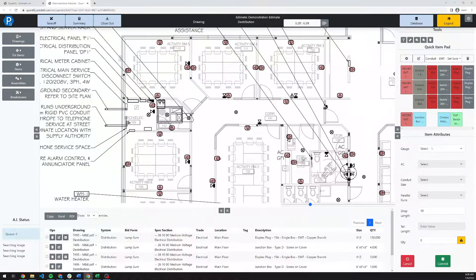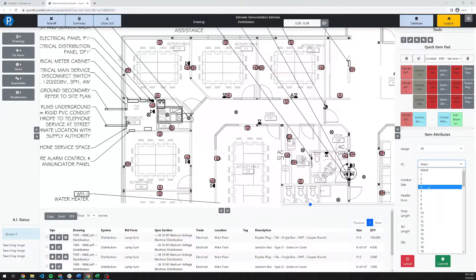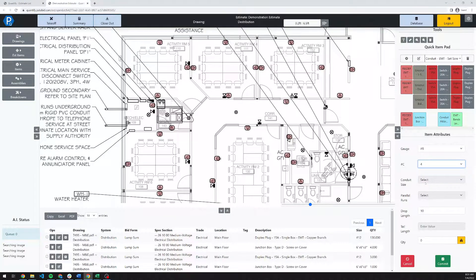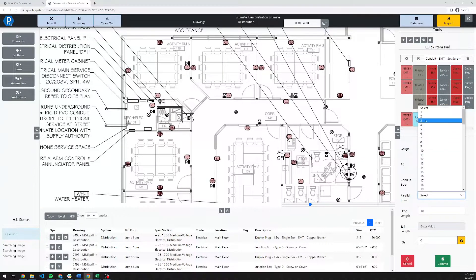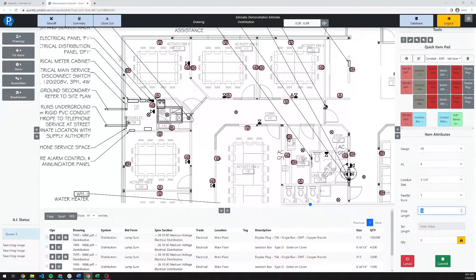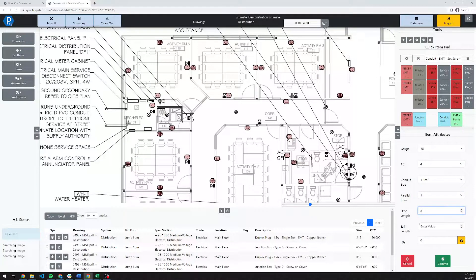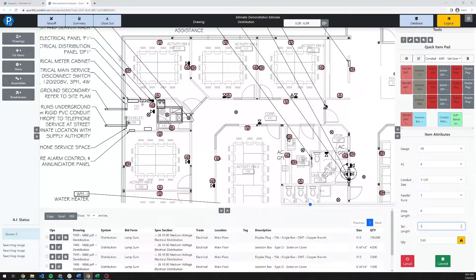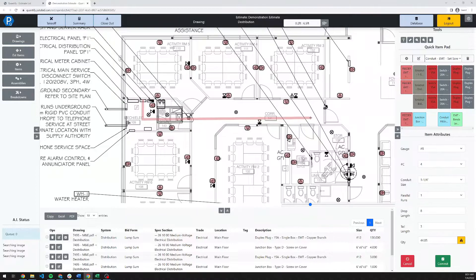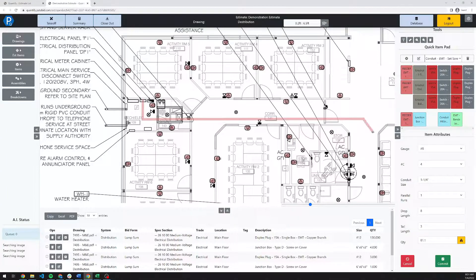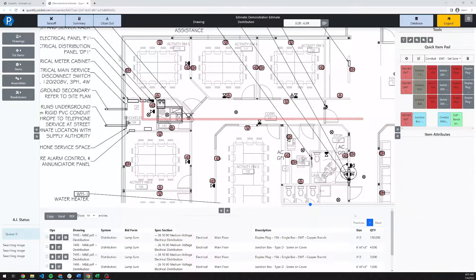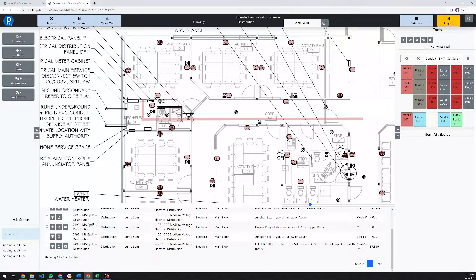Grabbing my feeder, again, this is an assembly. I'm going to select a small feeder here, several conductors, inch and a quarter. We're only going to have one run of it. We'll have a drop length down to the panel of eight feet this time. We're going to allow for a three foot whip inside the panel. Then I can simply click on that and start to go. You'll see in the bottom right here, the length measurement automatically updates. Left click and then right click to finish the takeoff. That is added in down here.